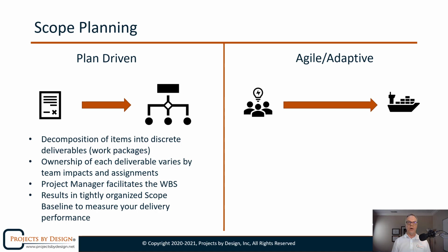Now, we oftentimes describe that with a couple of terms like minimum viable product or minimum business increment. They don't mean the same thing. Minimum viable product is what we have to deliver for that portion of the solution to hang together and be usable, in other words, something that we can generate value from. MBI is oftentimes associated with when we're trying to make incremental value delivery. We have something essentially relatively stable.